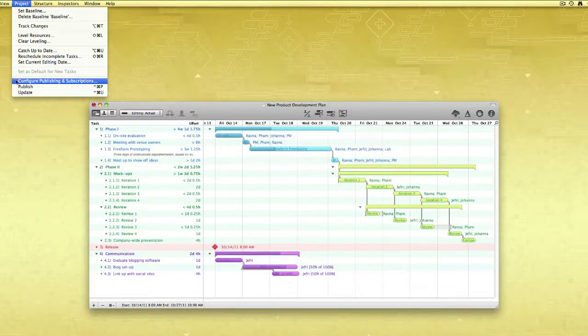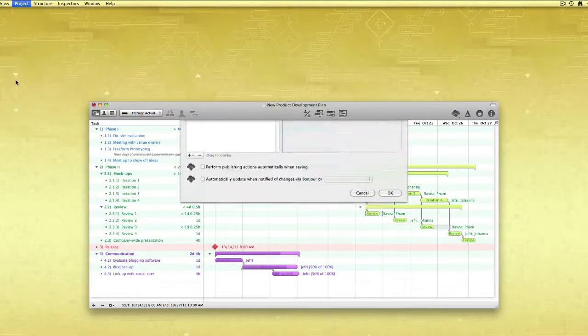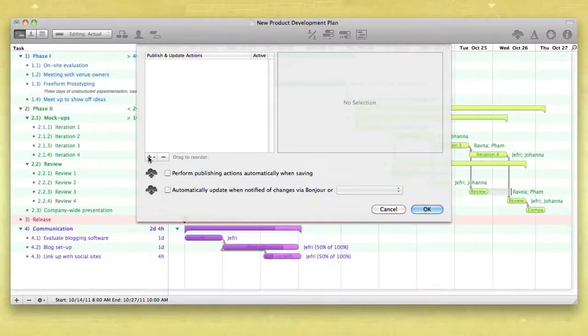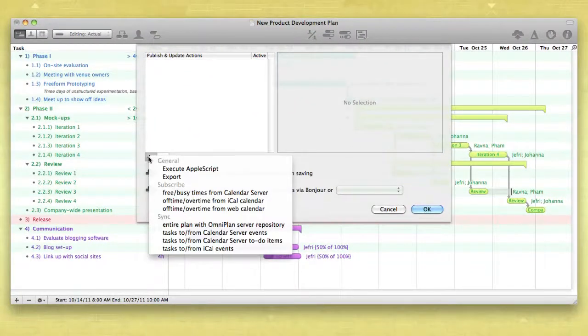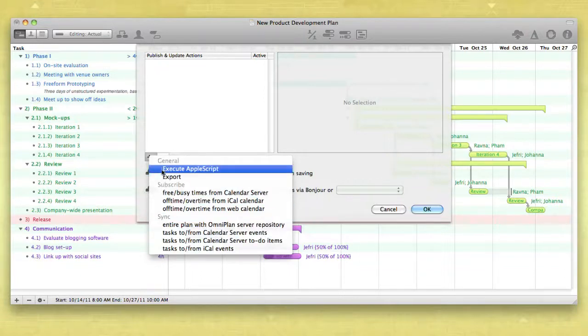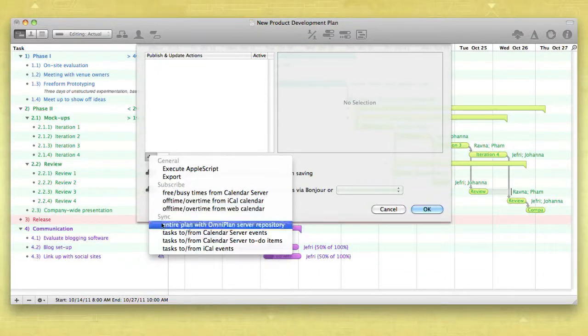Start by selecting Configure Publishing and Subscriptions from the Project menu. Click the plus button and choose an option from the drop-down. Use the sync options to make changes to the project and pull in changes from others.